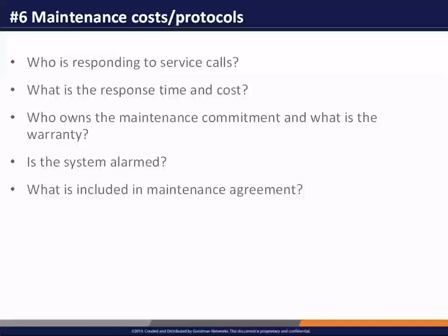At the same time, be sure you understand who is going to make that maintenance commitment, and what is their warranty. Oftentimes the assumption is that whoever builds the system is going to also maintain it, and that needs to be verified. Oftentimes that is the case, but it is not always the case, and that needs to be confirmed very early on in your discussions with whomever is funding and committing to the DAS build for you. You should also know, is the system being alarmed, and where do those alarms go?